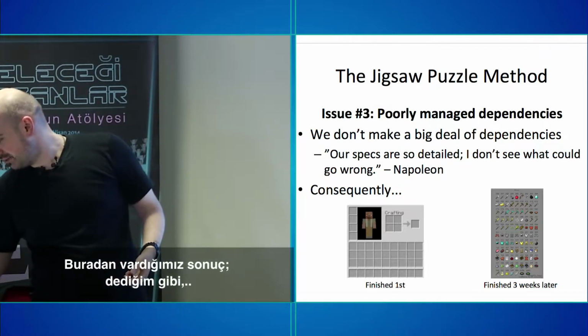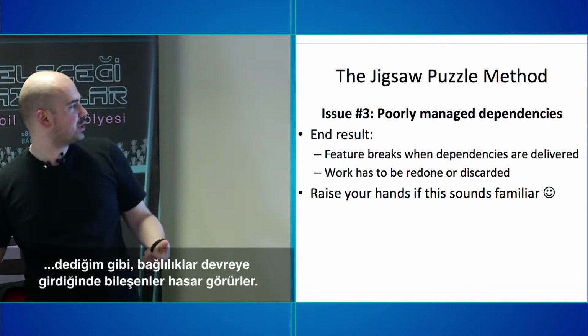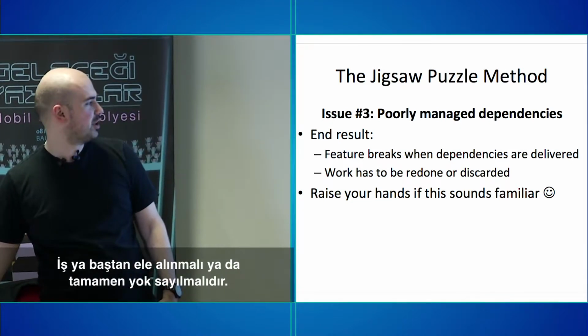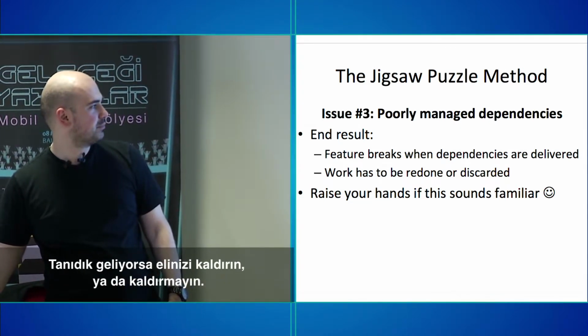So yeah, end result then. The feature breaks when the dependencies are delivered, like I said. Work has to be redone or discarded. Raise your hands if this sounds familiar or not.